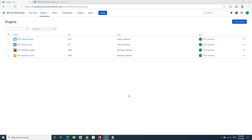Hello everyone, welcome again to this Jira Cloud tutorial. We are going to learn how to reopen a sprint in Jira. Reopening a sprint in Jira is very simple and straightforward in a classic scrum project, but in a next-gen scrum project that feature is not available yet, though there is a workaround which I'll discuss in the next tutorial.